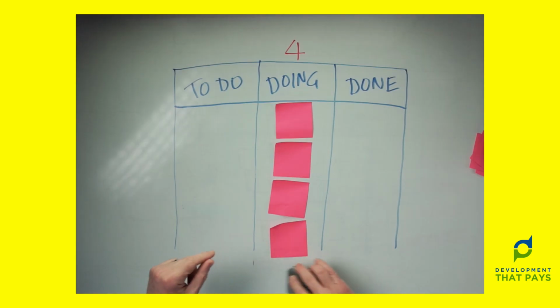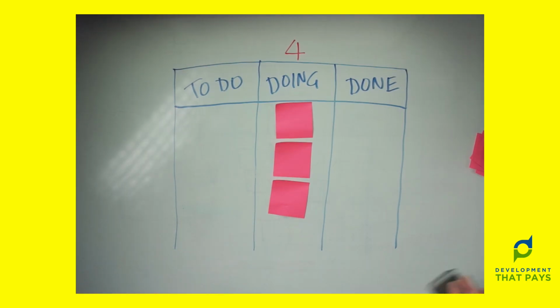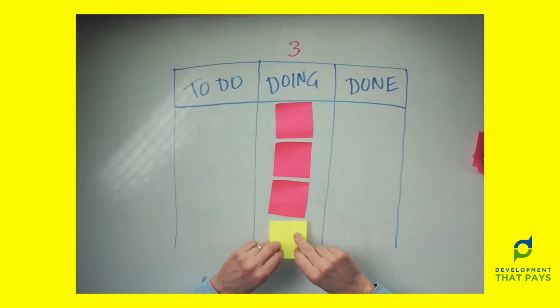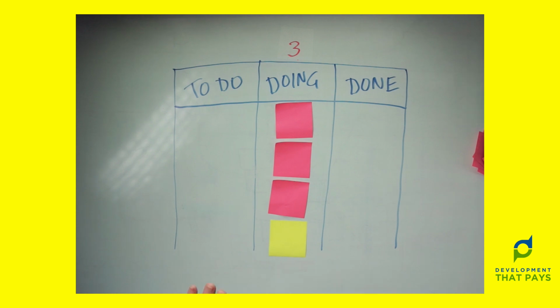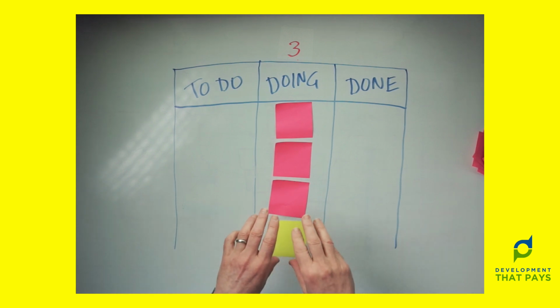Now, if you're using an electronic board, but it doesn't support work in progress limits, I have a little bit of a hack for you. Let's say, just to fit on my board, that this is the work in progress limit, just 3 items. A way of indicating that work in progress limit, and remember I did say this was kind of hacky, is to create a dummy card, ideally change its color, and it gets positioned at the bottom of the list here.